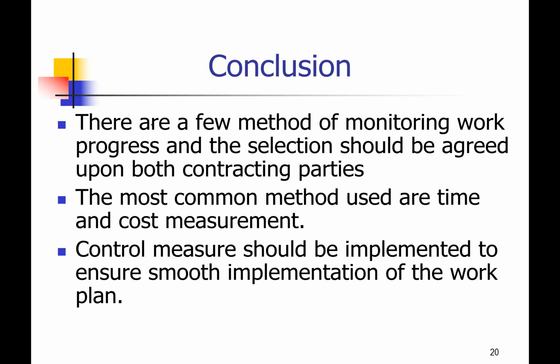The most important thing is to get the information, data collected, or getting the feedback. Okay, and then once you have the data, you analyze whether that data value is significant or not. If the value is not that significant, it's only small, then you don't have to react. But you must not forget to still monitor, because even a small thing can grow bigger.